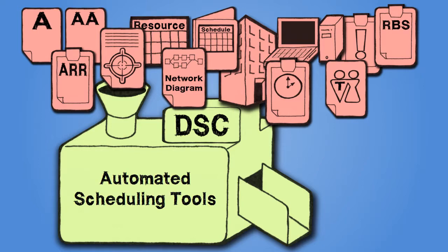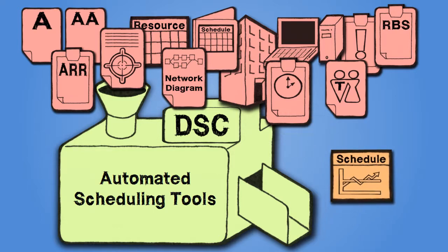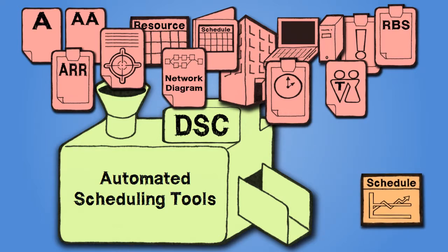The outputs of the develop schedule process include the schedule baseline. The schedule baseline is data that supports and explains the decision-making that went into the develop schedule process, and it must be approved by the stakeholders and the sponsor. The project schedule includes every activity and their start dates, finish dates, durations, and their dependencies. The schedule also contains the overall project start and finish dates. Typically, the schedule will be in a graphic format such as a project network diagram, a Gantt chart, or a milestone chart.